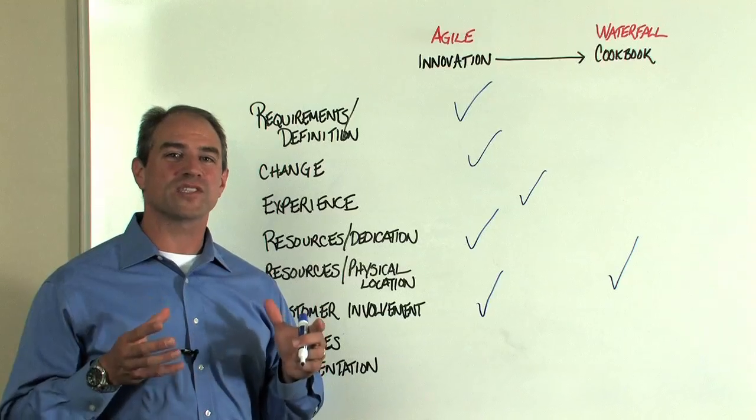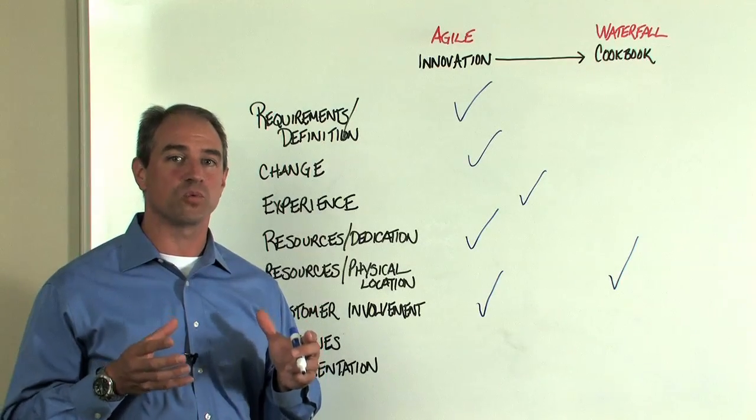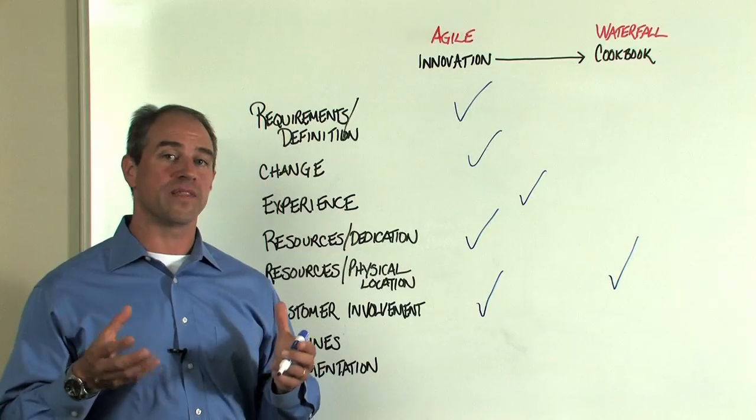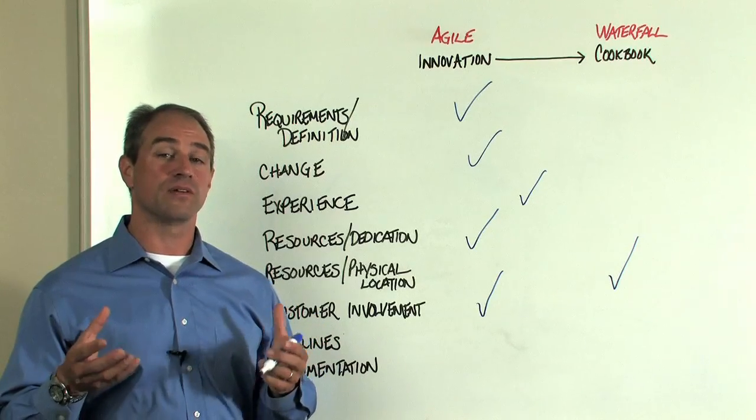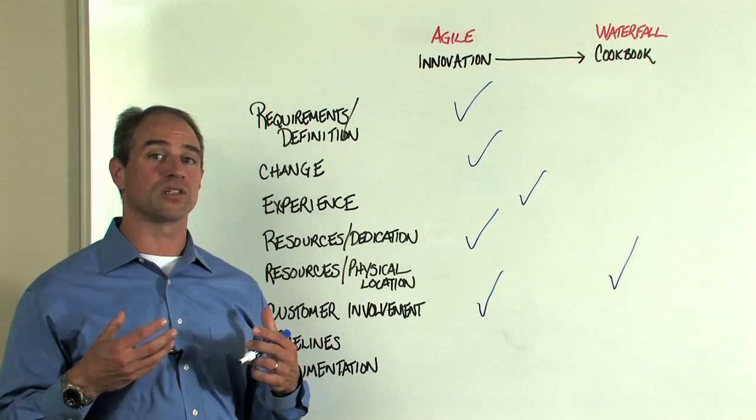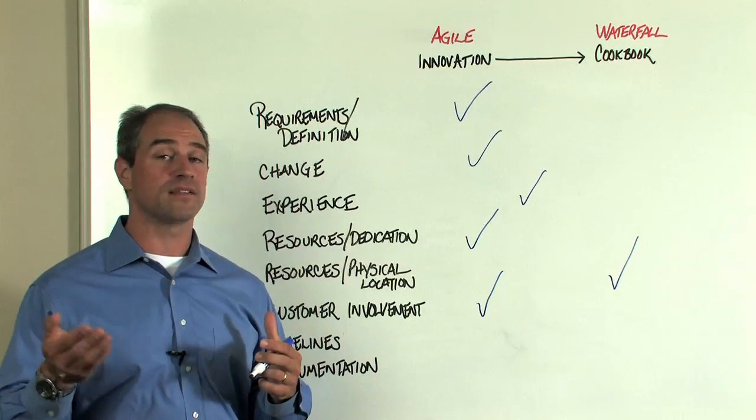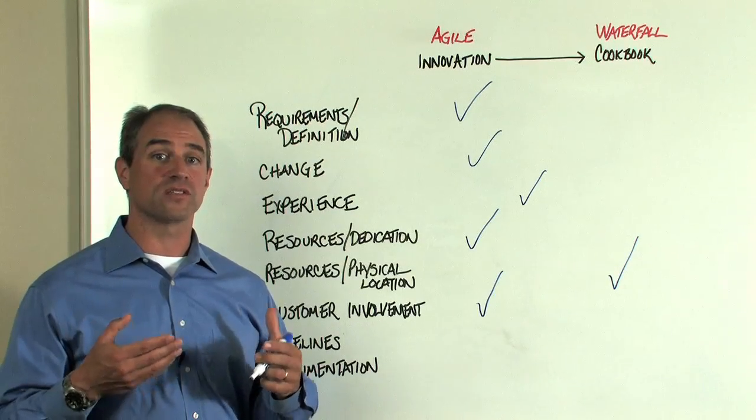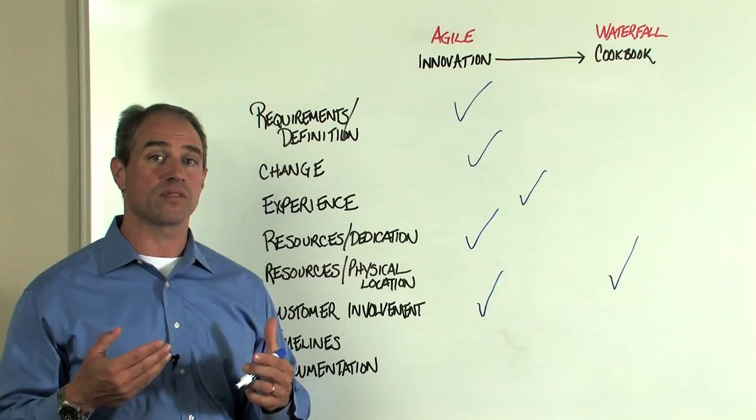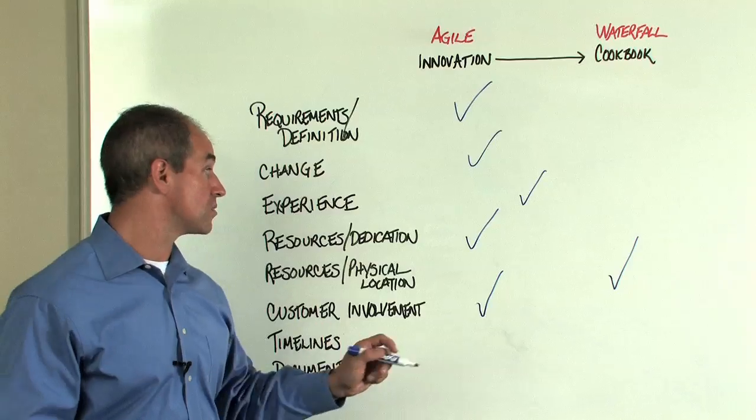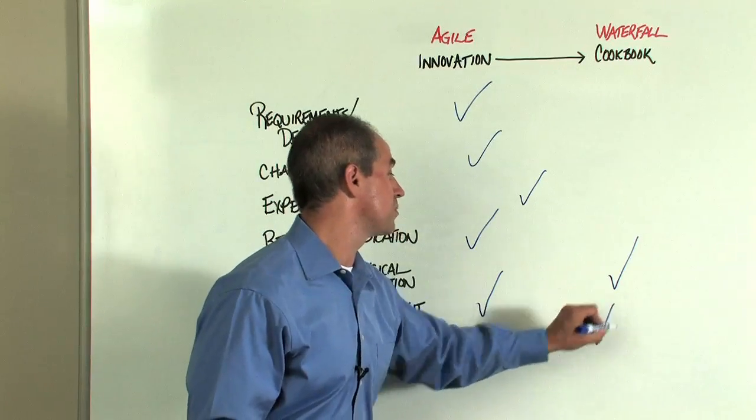Timelines. Do we have fixed timelines or due dates that we have to work towards or are we a little bit more flexible in what we can deliver and the timelines in which we can deliver them? If we're a little bit more flexible, we may be more agile, but if we have financial requirements, quarter end, year end, calendar restrictions, other types of initiatives that we have to comply with, we may have more restrictions on timelines. And let's say we do. So let's say for timelines, we may be a little bit more constricted.